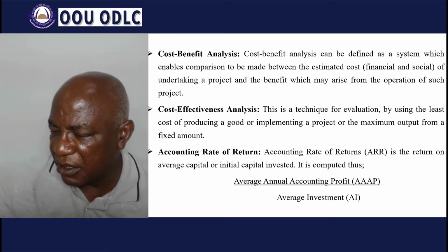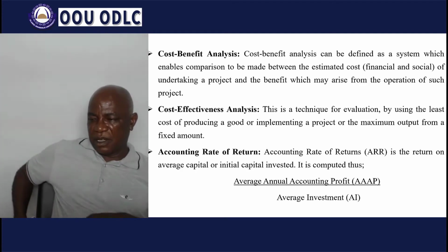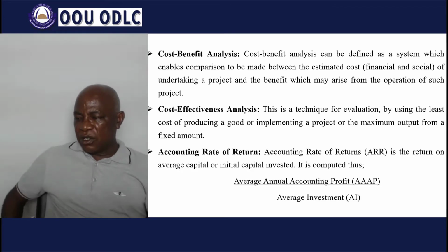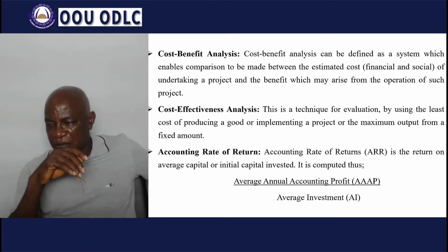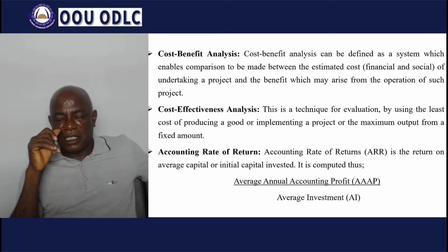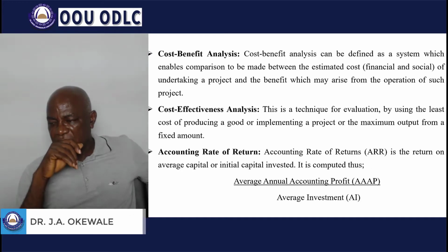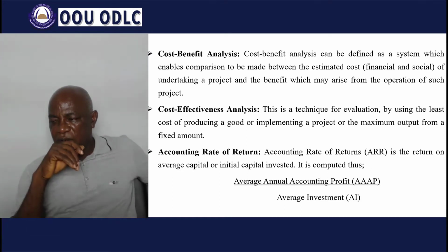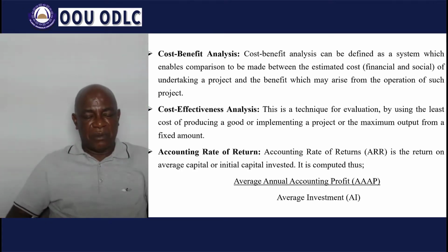Under cost-effective analysis, it involves number 1, defining the objective. Number 2, sourcing and assessment of alternatives. Number 3, selection of measures to be adopted. Number 4, development of cost estimates, then its collation using the agreed policy. Then number 5, creation of a model relating to cost effectiveness. And number 6, building of different expenditure models using cost estimates. We now come to some of the popular methods.